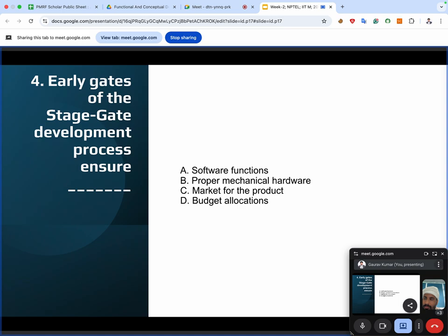We explain all this in gate meetings, but there is a separate system called AR. In that we tell them we need this much money, and financially we tell them the ROI and payback periods and all those things, and based on that the higher management allocates budgets. After that we invest money into the production. You understood me, right? So that's why I said C and D.